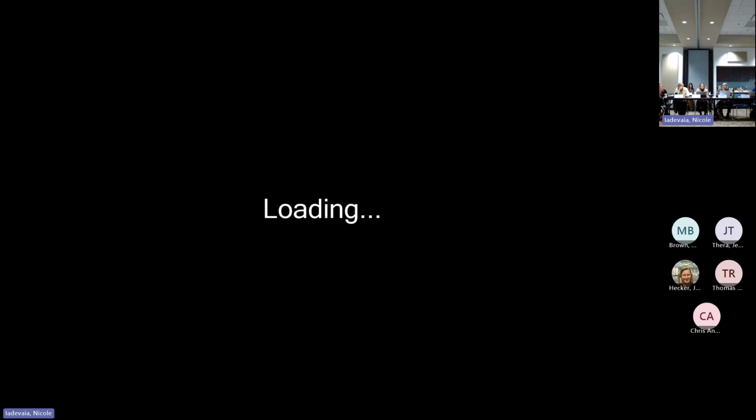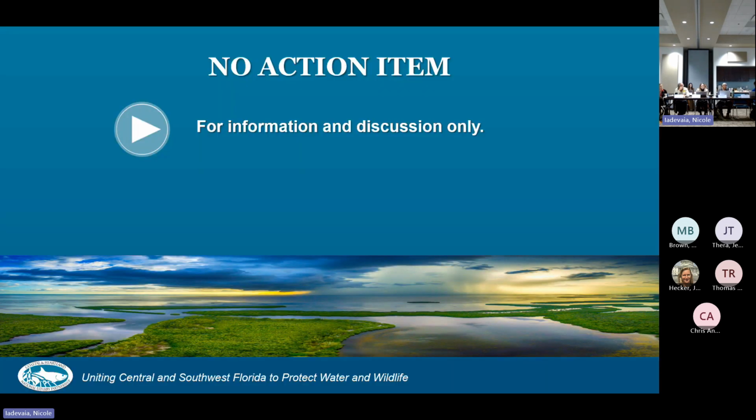So we've been going back every 5 years, comparing against the baseline and determining any maintenance needed. Not sure how many of these sites have conservation easements associated with them, but that long-term management plan application of a 5-year look back goes on in perpetuity until all parties agree it's no longer necessary. So every 5 years, we're going back and looking at some of these restoration efforts we've done.